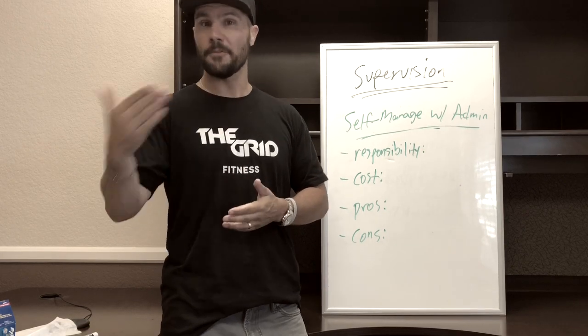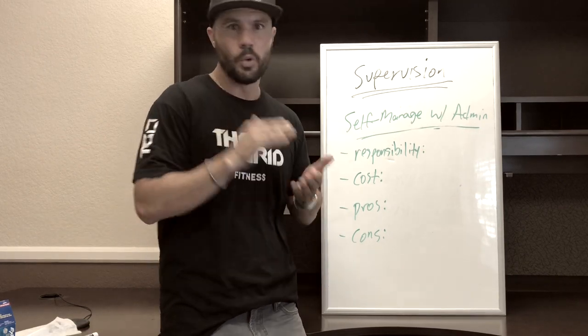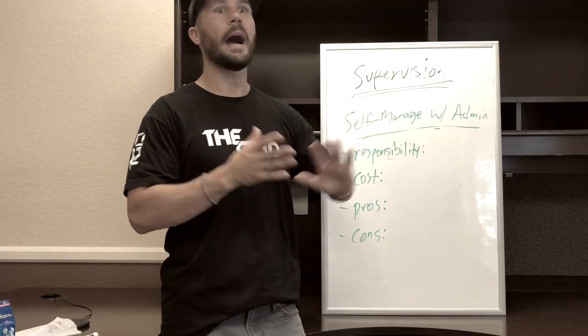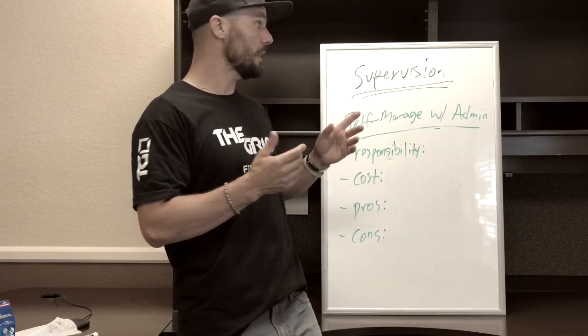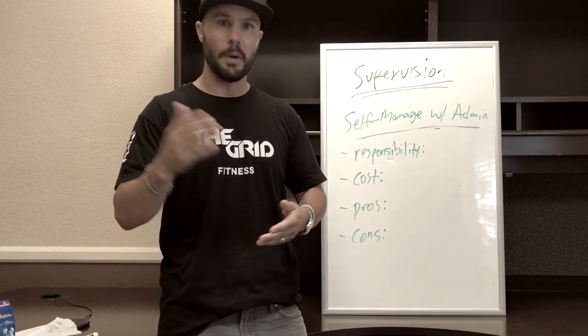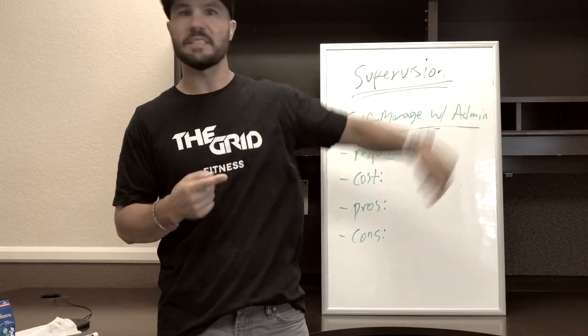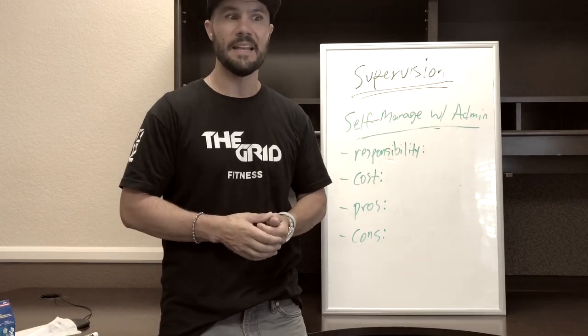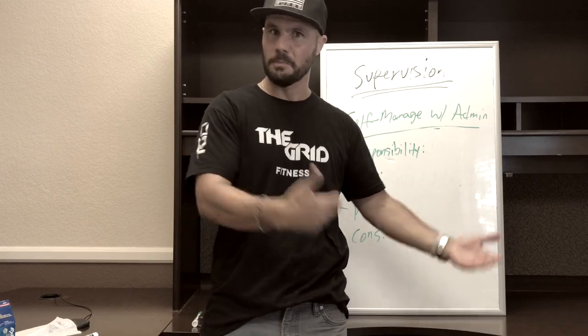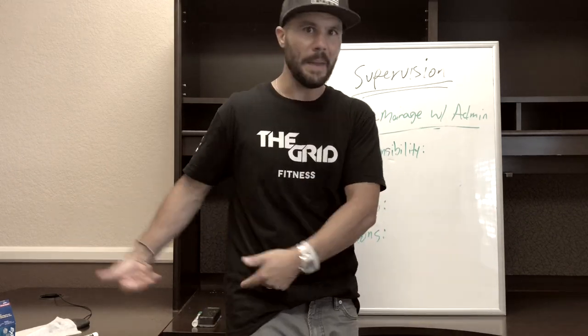Now, if I was doing a different model where I was like, hey, I want to make $20,000 a house and I want to do 50 houses, entirely different model. Maybe now you can have a project manager or a supervisor that's payroll with a bonus incentive, and they can run around to 10 different projects at a time every day, and they're easy to manage because they're basic rehabs, because they're smaller houses, kitchens, bath, carpet, paint.